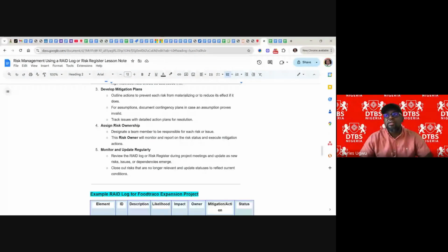Like I say, we should have a status meeting at least once every week where we'll be reviewing the risks we already have, or the issues, or dependencies, whichever one, and keep on reviewing them, monitor the progress towards resolution, and look out for new risks coming up. And then we must close out risks that are no longer relevant. Once we have a risk that is no more relevant, we close it up.